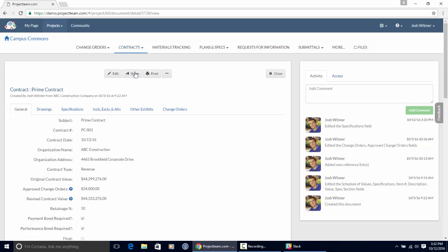I will say you don't need to go through all those steps. If your company doesn't go through the steps of creating a directive and then a PCO and then a change order, you could start at any one of those and it'll end up the same. So I could just jump right to creating change orders to affect my contract. That would be fine. But we do have the extra forms in there, so if you wanted to go through the full process, you're able to do that.